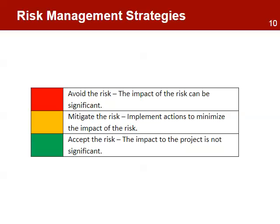Risk mitigation strategies are actions the project will take to reduce the impact of the risk event on the project. There are basically three types of actions available: avoid the risk, which is to adjust the project plans to eliminate or reduce the risk; mitigate the risk, which is to implement actions to minimize the impact of the risk; and accept the risk, which is to make a deliberate decision to accept the risk without engaging in special efforts to control it.